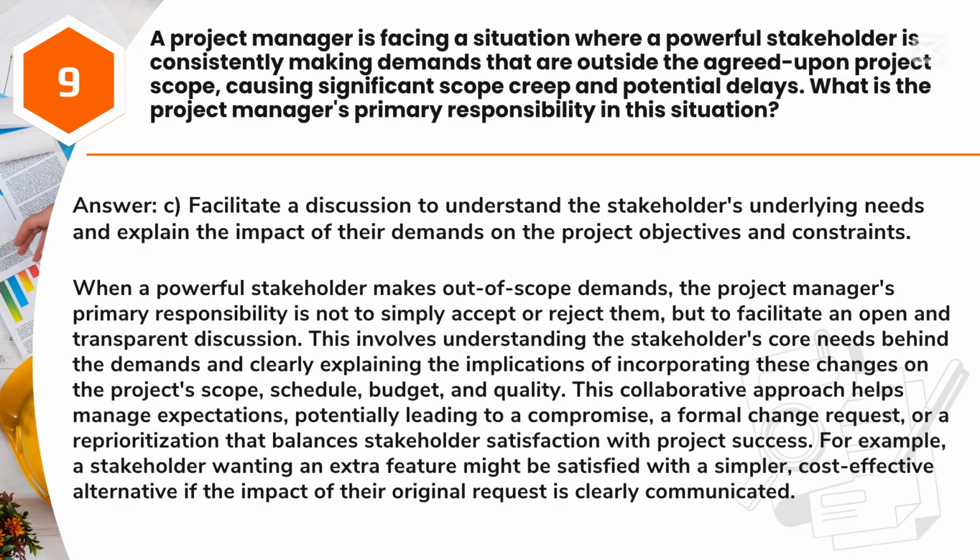Answer: C. Facilitate a discussion to understand the stakeholders' underlying needs and explain the impact of their demands on the project objectives and constraints. When a powerful stakeholder makes out-of-scope demands, the project manager's primary responsibility is not to simply accept or reject them, but to facilitate an open and transparent discussion.